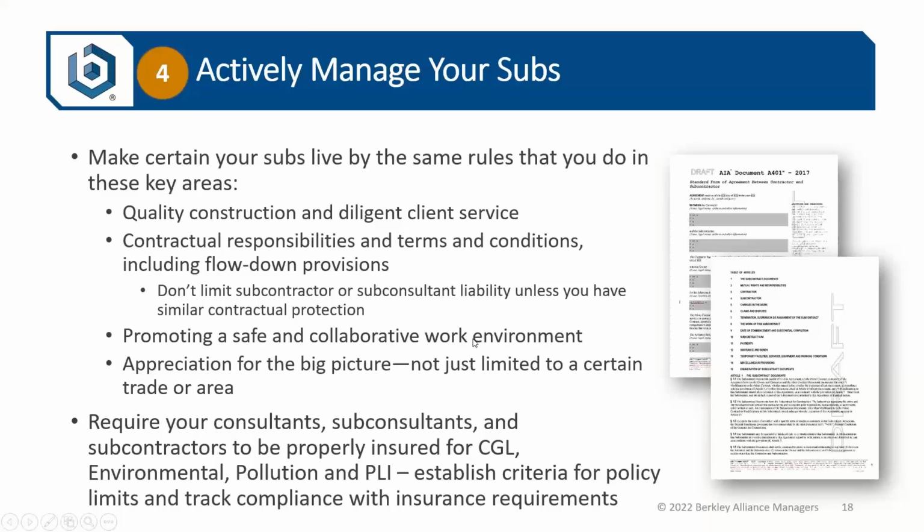Exterior wall components. Again, traditionally curtain wall, final design, that liability has been common really in my entire career and even beyond for about 50 years, the final design of curtain walls. But that continues on to other aspects of the exterior envelope and the way those are put together. So be very careful about that. You want your subcontractors to be properly insured.